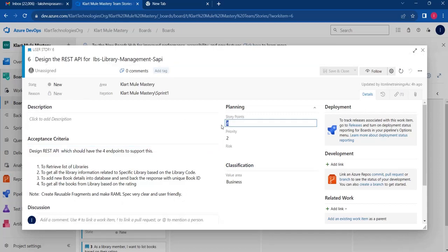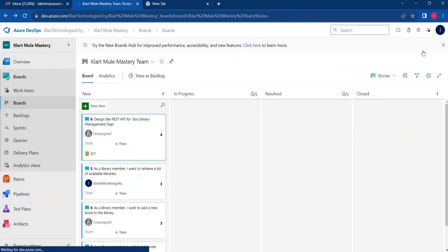So likewise, developers, testing team, scrum master, everyone will discuss in that sprint planning call. They will go through all the user stories one by one. They will see if there are any dependencies, or if you need any more information to complete this assignment. We will discuss everything in that call. We will estimate the user stories first. That is the first step.